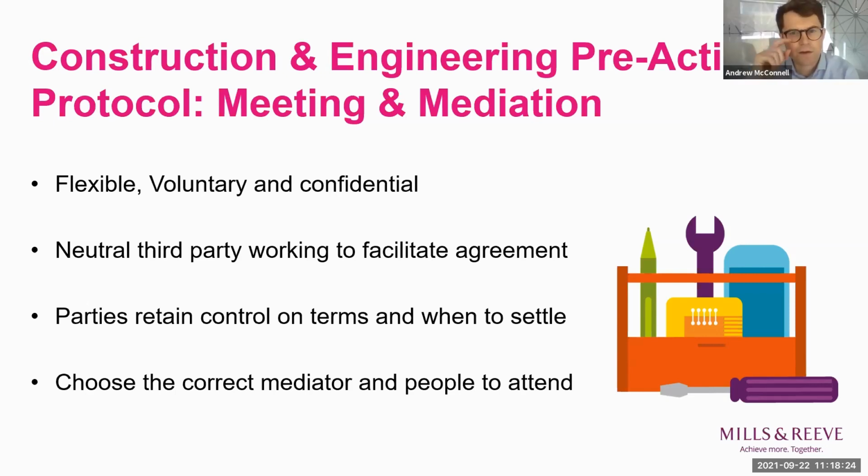Yeah, thanks, Andrea. So I know many people will be more than familiar with mediation, but I just wanted to recap on some of the basics. So mediation is obviously a flexible, voluntary and confidential form of ADR, and it involves a neutral third party, being the mediator, assisting the parties towards a negotiated settlement. And crucially, for a mediation, the parties retain control over A, whether or not to settle, and B, if so, on what terms they want to settle. And unlike a judge or arbitrator, the mediator will not decide the case on its merits, but will work to facilitate an agreement between the parties.